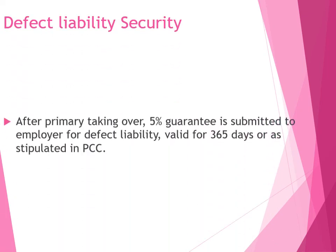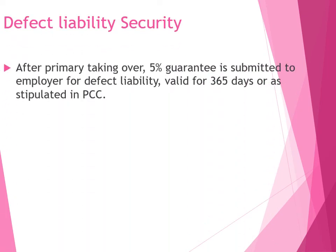Defect liability security: after primary taking over, a 5% guarantee is submitted to the employer for a defect liability period valid for 365 days after the completion and handover.